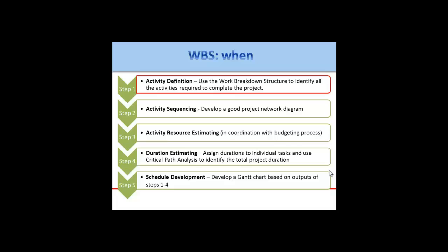How can you schedule? How can you budget? And the reality is that if you don't have this idea of all of the work of the project in detail and comprehensive, so it covers the direct work and the indirect work, the reality is that you can't do accurate budgets or accurate schedules.